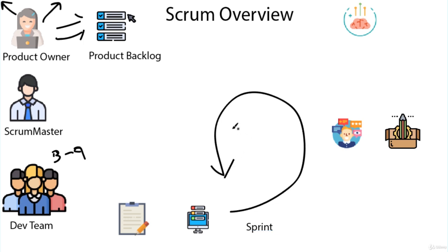They're typically 1 to 4 weeks with a recommendation of as quick as you can do it, but 2 weeks kind of sounds like the prime. If you have something where deploying and testing only takes like half a day or less, then you might be looking at a 1 week sprint and you can adjust even quicker for that. But 2 weeks is a good place to aim for. So 1 to 4 weeks.